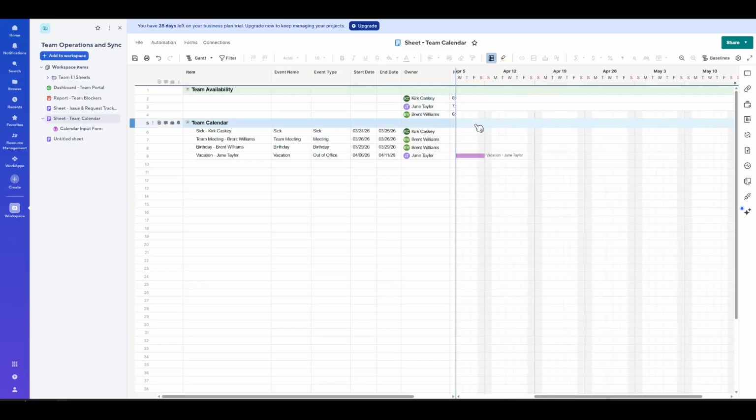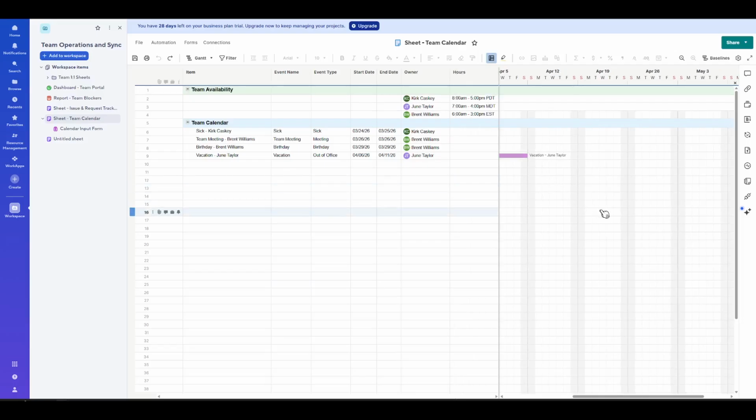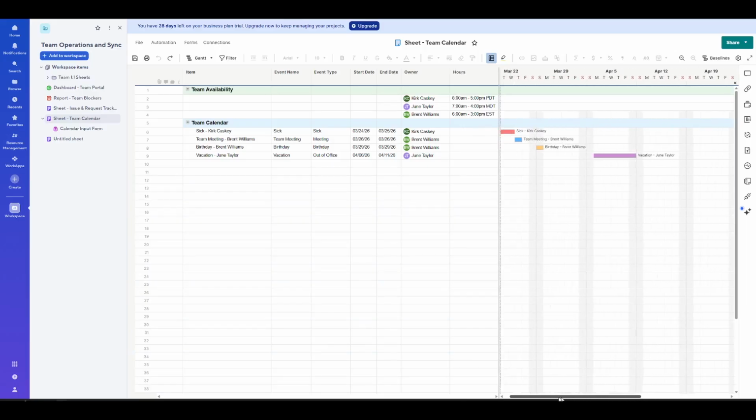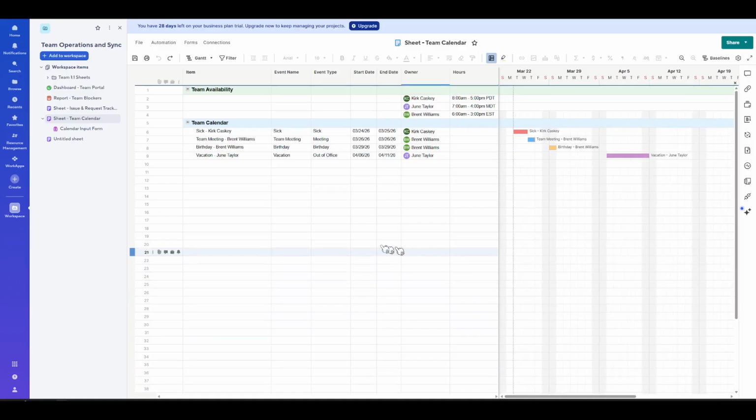It just presents the same information in a timeline format. If a task doesn't have the necessary date fields filled in, it may not appear as a bar on the chart. That's normal. Gantt view relies on start and end dates to draw each task on the timeline. You might also see color variations or shading on bars that reflect things like percent complete, giving you a quick sense of progress without digging into the details.